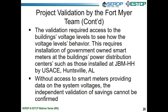One thing I should mention is that without the Army Corps' smart meters, it would have been difficult to independently validate the savings from Dominion Energy. It is essential that someone implementing this project have independent smart meters at the various destination points to read the actual voltages that loads are receiving and compare that with the bus voltages, which is usually in excess of load voltages after the controllers take over the voltage reduction.